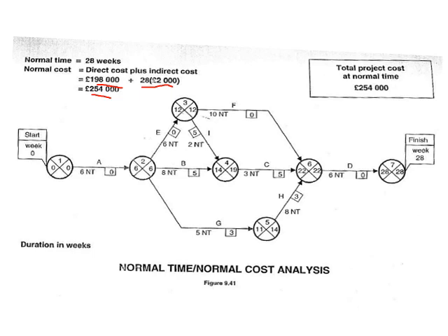What they did is they just put in the time durations, and then they had a look at what the longest path is to see what the duration of the actual project is. A simple way of doing that is starting from the back. I'm going to mark that in green, going backwards and looking for the longest path. So the first item is D, that is on a critical path.